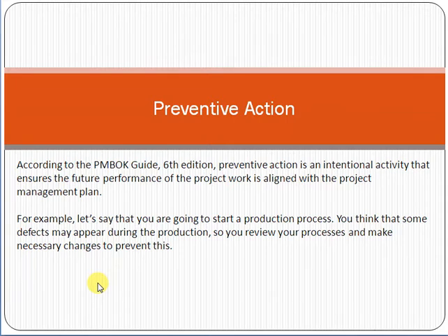So as a preventive action or a proactive action, what you can do before the project starts is plan 5 days of training for the project team, so that they can attend the training and get the required skills for the project. So friend, this is the concept of preventive action, proactive action. What you have actually done is taken the action proactively. So this is the preventive action. Just see the word here, preventive. Before anything happens, you take the action. So this is the proactive approach.